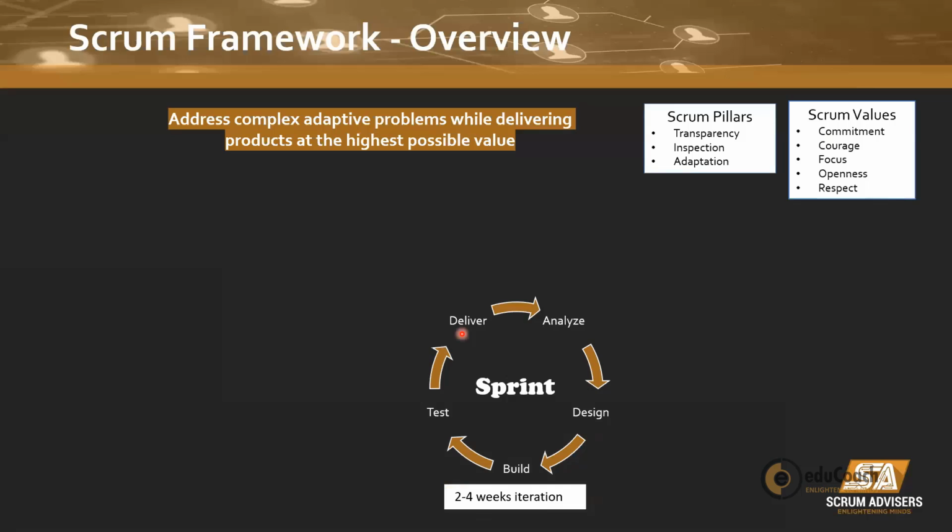So remember, we don't have a separate sprint for analysis. We don't have a separate sprint for design. We do not have a separate sprint for build. We do each of these things to deliver an increment within one sprint itself. So within one sprint, on maybe one feature, we would be analyzing, designing, building, testing and delivering in one sprint. So the whole team's focus is to get this part done.